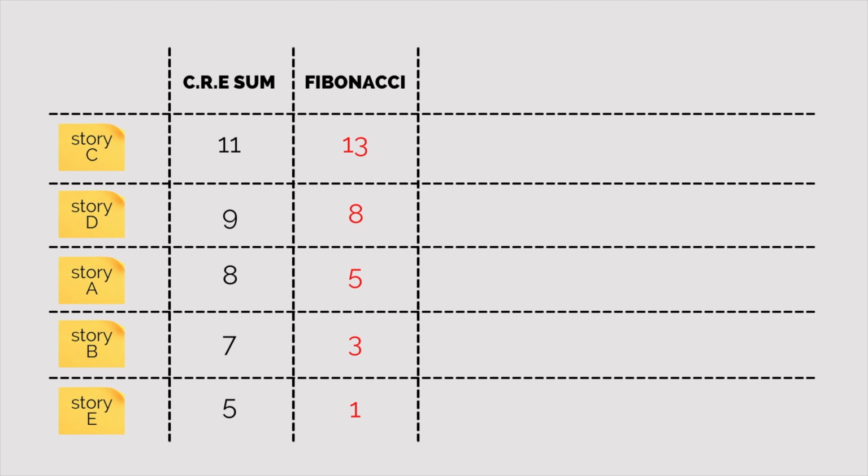We use the reference table, the one that we use to create our reference stories, and treat each row in that reference table as a swim lane for different sizes of user stories. We then ask each team member to silently pick a story from the story map, one by one, and put it in the appropriate swim lane that they think is the right size for that story. The team members can also move stories between swim lanes if they believe that the last person didn't put the stories in the right lane.